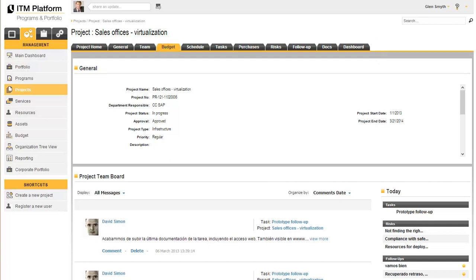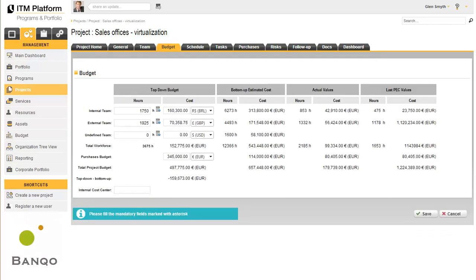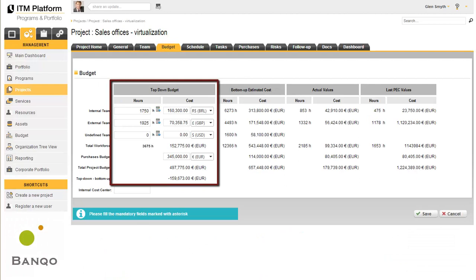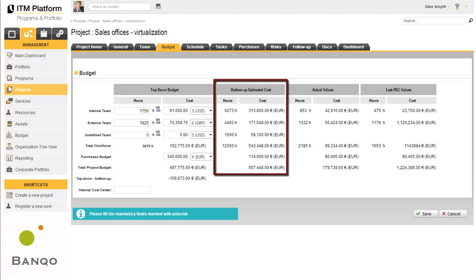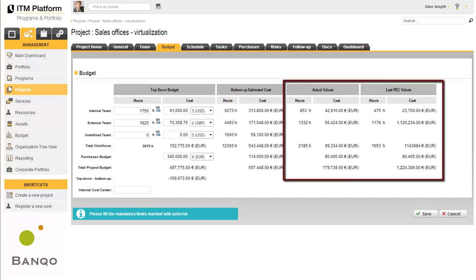The budget section can be used to define the efforts and economic resources necessary to carry out the project. ITM Platform enables all monetary values to be entered in any currency. It will also be possible to compare this top-down budget with the bottom-up estimate made by the project manager and then compare it with the actual values at this moment in time.